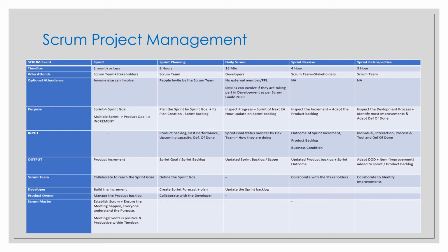During the sprint, as a Scrum team gains more experience, it is expected that the definition of done will be broad. If your Scrum team is more experienced and cross-functional, the definition of done is broad and contains more strict criteria to ensure higher quality. During the sprint retrospective, the Scrum team plans how to increase product quality, and one way to ensure this is by adapting the definition of done.